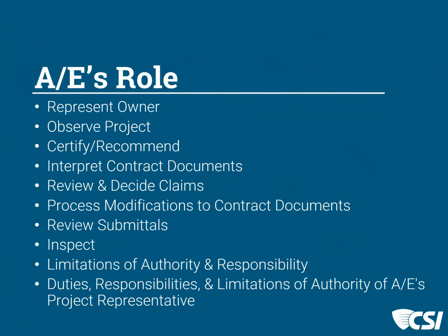When it comes to a pay application in North Carolina, you are certifying. You are promising that what the owner is paying for is actually there and in place and in conformance with the contract documents. So help you good gracious. So it's a very definite and very serious word, certify.